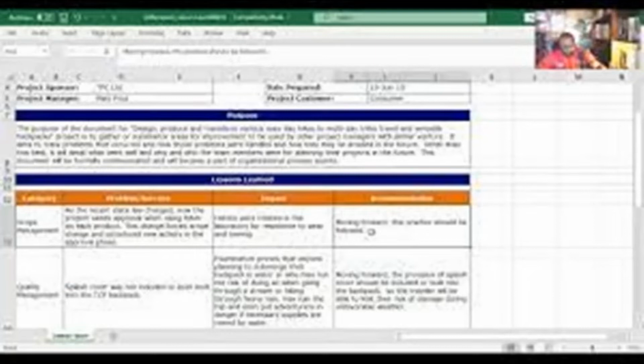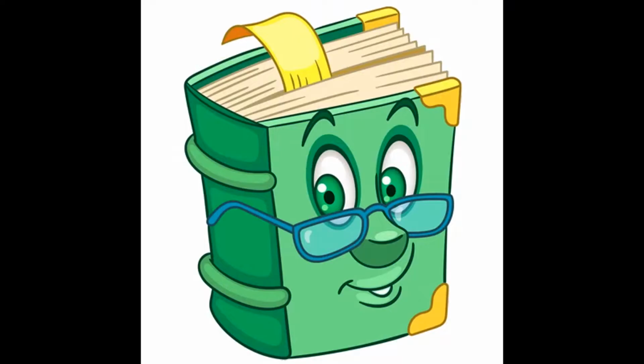The persons or teams involved in the work are also involved in capturing the lessons learned. Knowledge can be documented using videos, pictures, audios, or other suitable means that ensure the efficiency of the lessons captured. At the end of a project or phase, the information is transferred to an organizational process asset called a lessons learned repository. Project management plan updates.